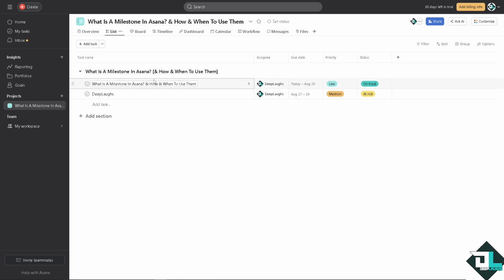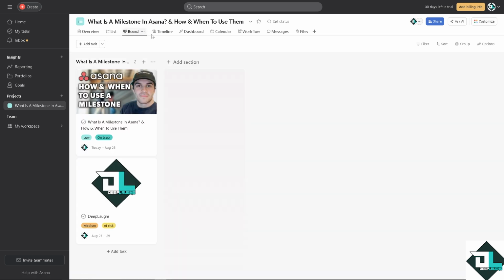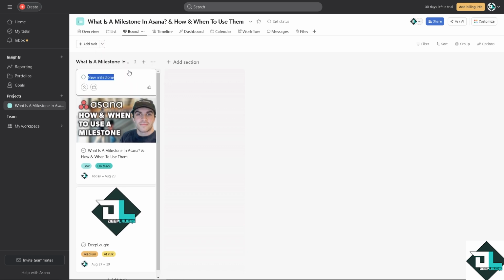Now, for example, you are already here on the dashboard. There's going to be an option that says add task. There's a plus button here, and there is a drop down menu where it says more actions. I want you to click on it, and as you can see, you can simply click on add milestone. That's one way. And the shortcut is Shift Tab M. We're going to do that separately so you have multiple options for creating a milestone.